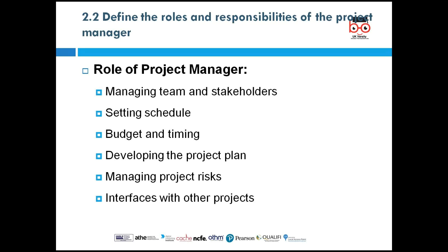And then every good project manager should be able to design a budget, a nice budget. Often, people who are bidding for projects are going to undercut to be able to gain the contract. But any sensible project manager will know that if you undercut any bidding and you get it, you're going to end up in trouble, because you've won the contract, but the amount of money involved is not going to be enough for you to complete the project.